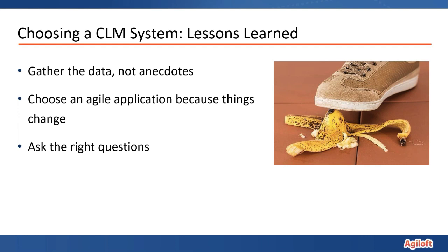So I think it's really critical that you take a very thoughtful approach and give yourself the time to do this. I understand timelines and having to work to them, but at the end of the day, we wasted 6 months of time because we didn't implement the right configuration of Agiloft for our people. Maybe if we could have taken a little bit more time, gotten better feedback initially and really thought it through and gone live with a minimum viable product at first and then built it out, we wouldn't have had to do a redesign.